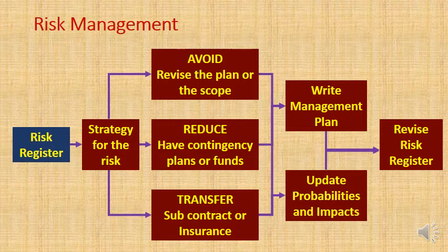Let's go back to the shrinkage cracks. Well, basically, what if the concrete was subcontracted to another company? That means if there are shrinkage cracks, they have to carry that risk. They are the ones responsible for fixing the cracks. And so it becomes their risk rather than yours. It's been transferred over.